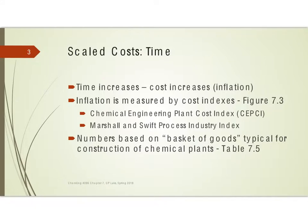We are considering ways that we can estimate costs, and right now we're looking at when we have existing data. I've purchased something at one point in time and I want to purchase something else similar to it. In the last lesson we looked at what we would do if the new item was going to be a different size. Now we're going to look at what if we're purchasing something in a different time, so the value of the dollar has changed. Over time, costs are going to generally increase due to inflation, and we can measure this in a lot of different ways, but we're going to typically do this using cost indices.